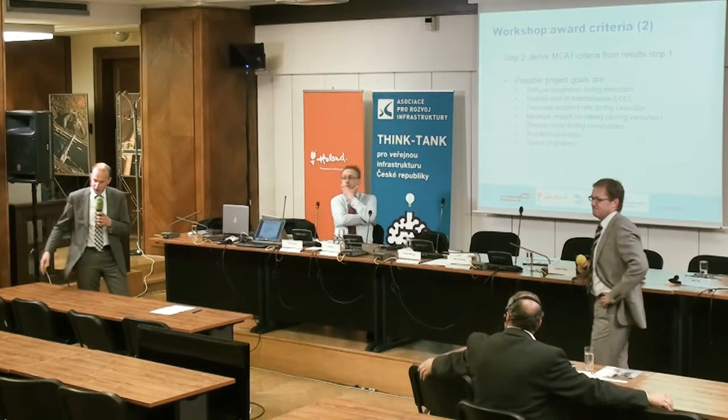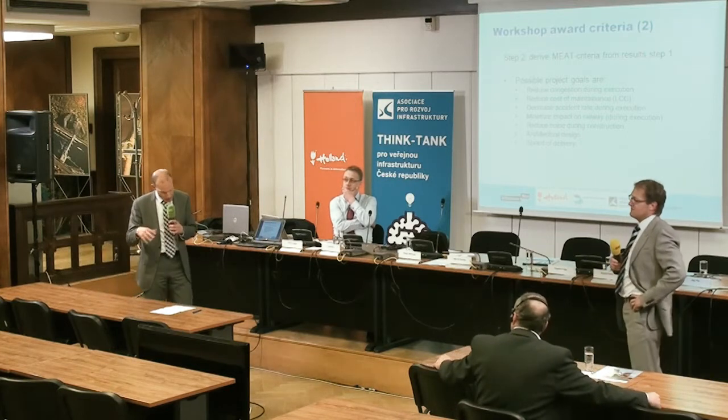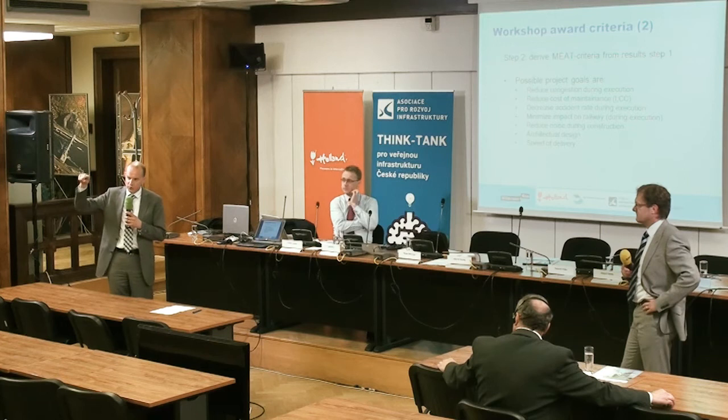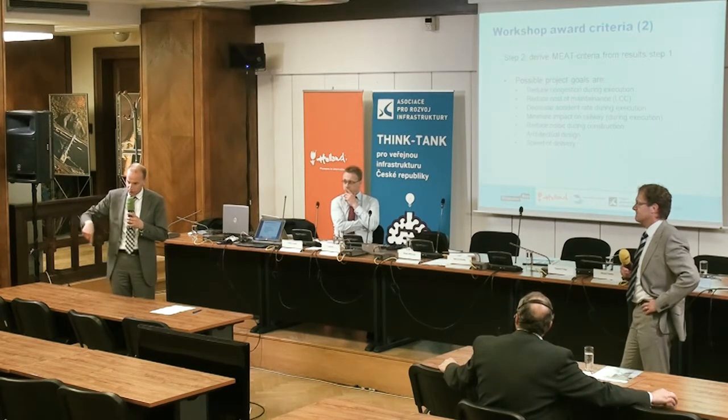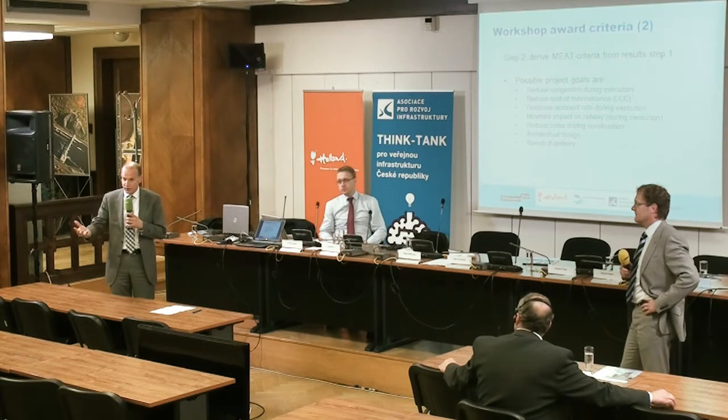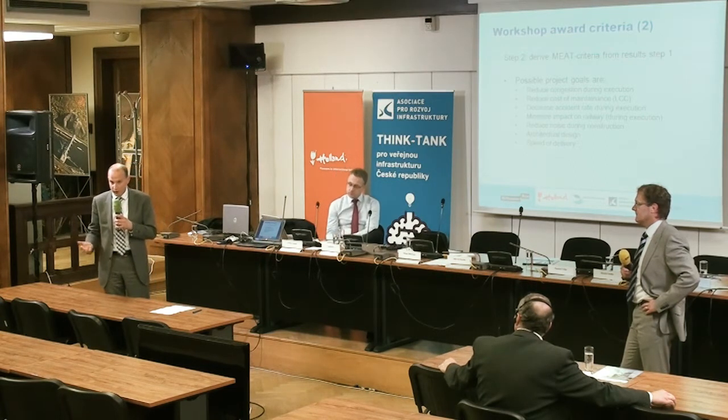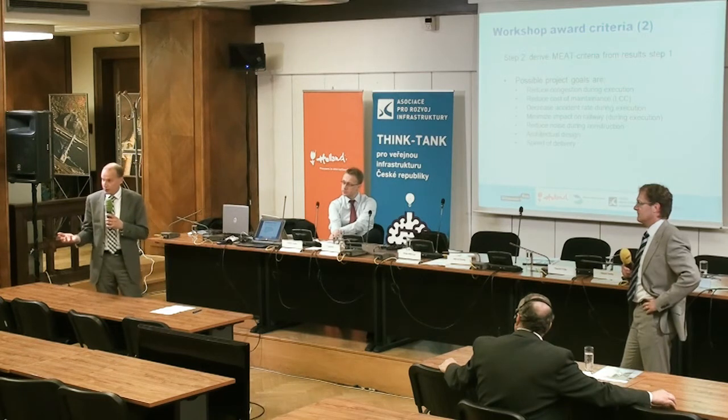Yeah, so what we do in a project, usually we sit down with the project team, and with the project team we come up with these ideas. And then what we do is we go back to the client. So that's the, how is it, opdrachtgever? Principal. The principal. You go back to the principal, and you ask him what he thinks is important. So that's one thing we do, because he's funding the money. And then what we also do is we go to the stakeholders that are involved in the project. Could be the municipality or province or whatever. And we also ask them what they think is important.